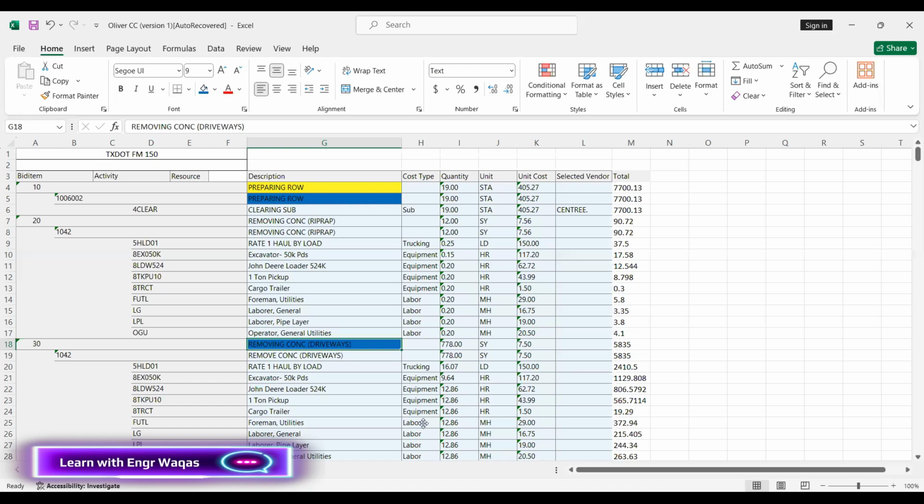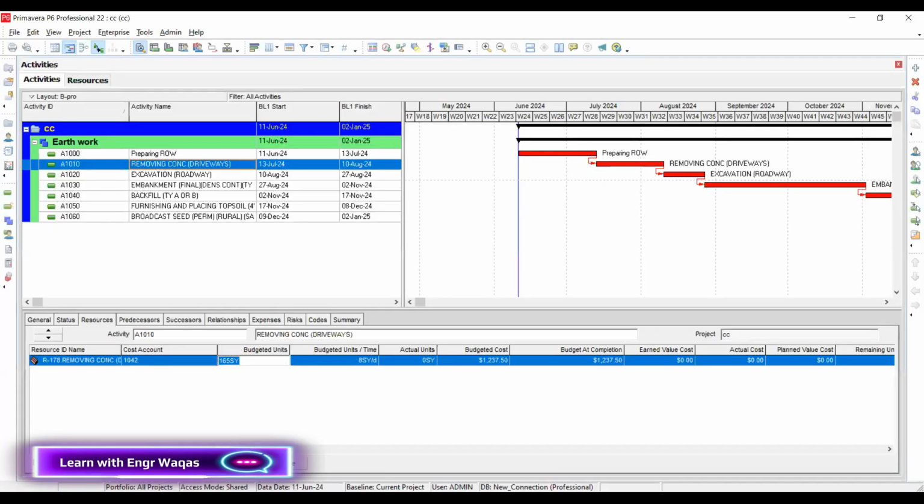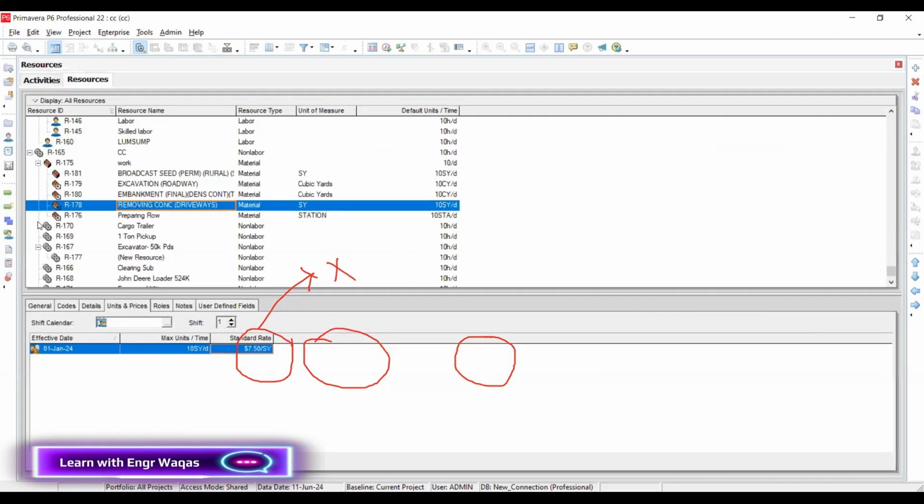778. Just give me a moment. This was the confusion, let me clear it. This is total effort. This is per day effort. I was confusing that with what gives you cost. No, this cost will be concluded. Obviously, this factor is going to multiply with your resource per day cost. This one will multiply with this one. You got it? So that's how it's going to be calculated.